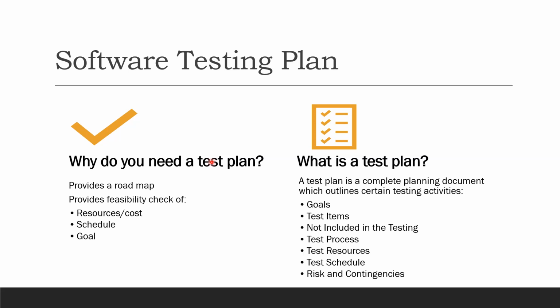Even while you're doing the end-to-end, once it starts, you can still raise risks because it happens. Defects can come in and they don't get fixed for a while, and you're almost done with your testing. You're about to enter code freeze. That's a high risk that can put your release in jeopardy. So risks are more often than not always present, and you have to make sure that you identify them.